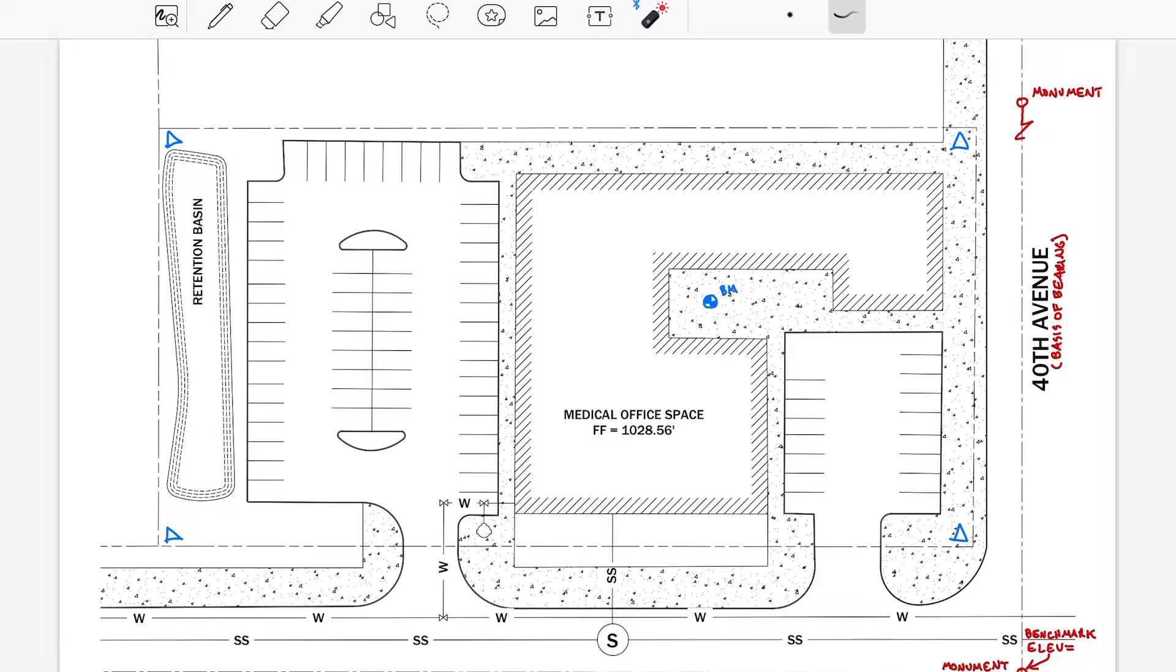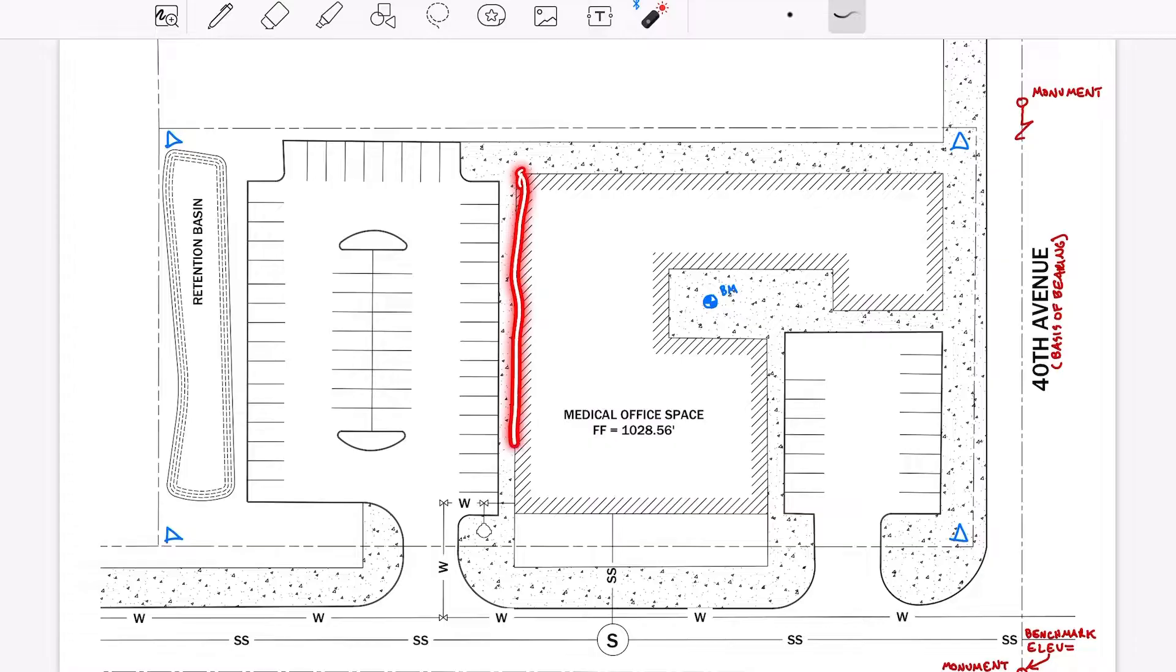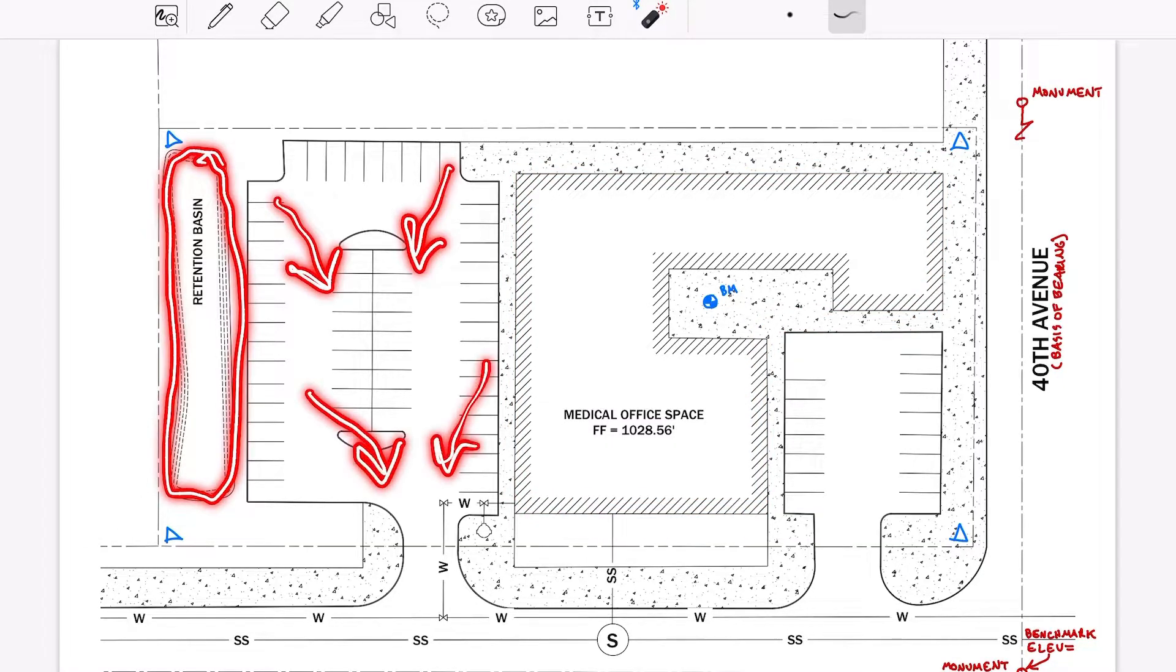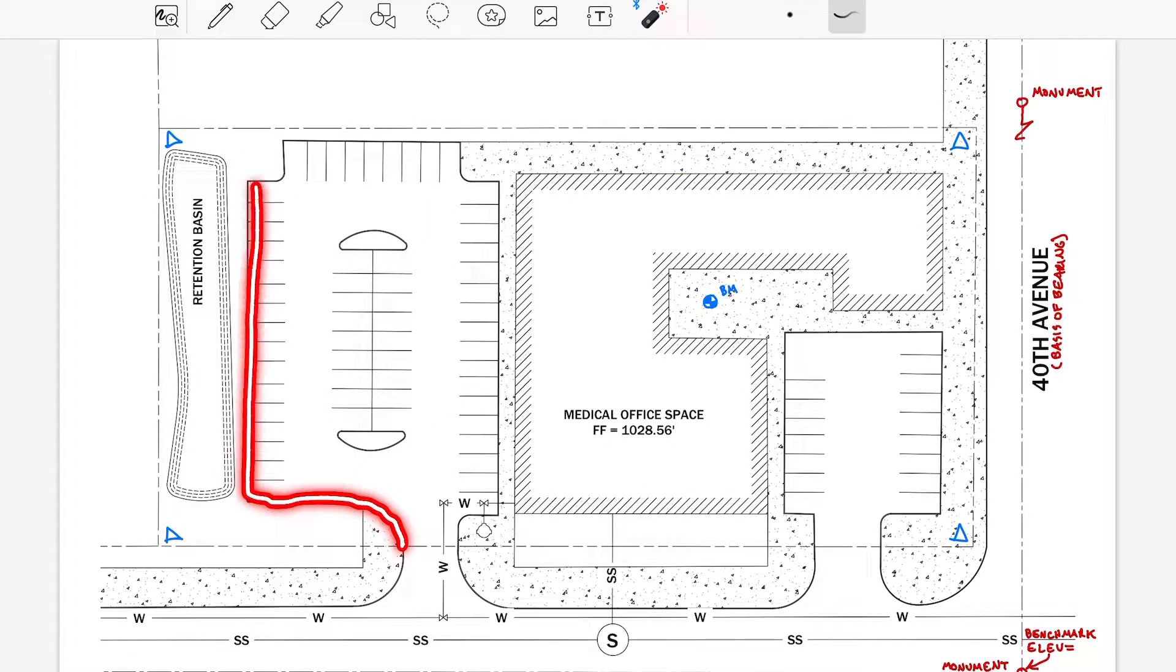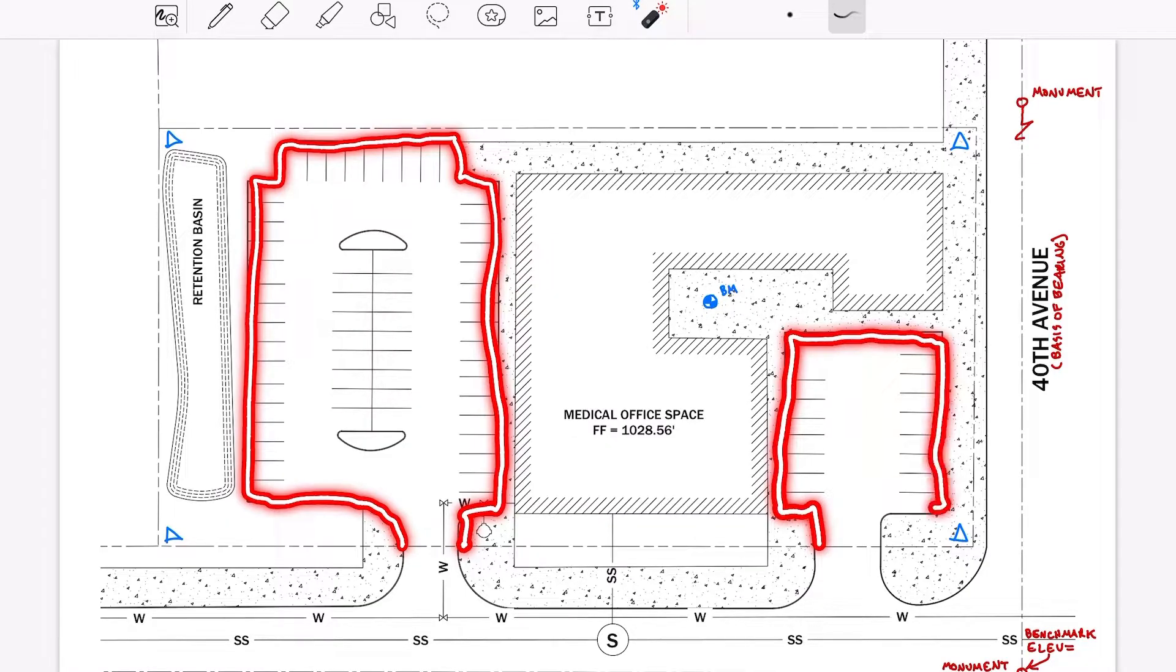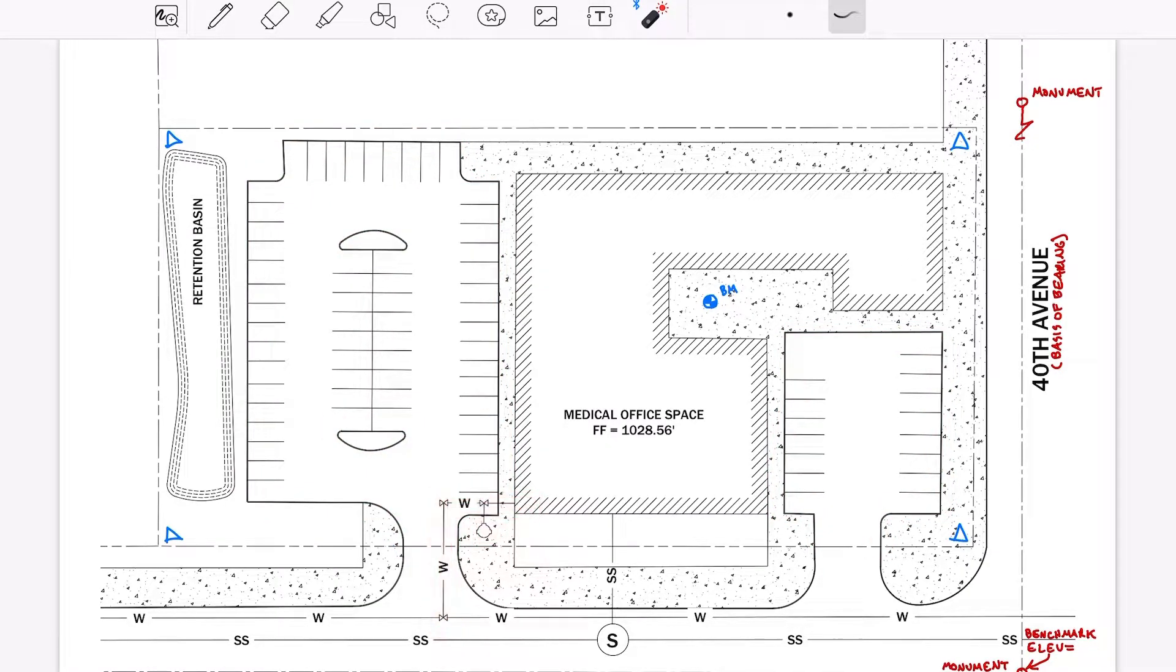Tasks included in the civil package are generally the layout of items found in the civil plan set, such as the building envelope, site grading for drainage purposes, curb, planters, walls, and utilities as they run through the site or connect to the building itself.